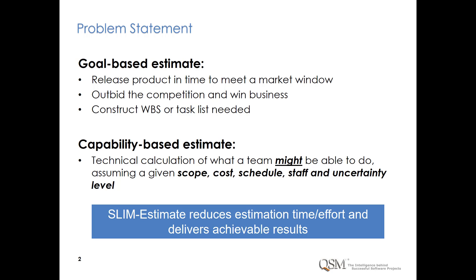Typical projects overrun their estimated schedules and budgets for the following reasons: unrealistic estimates that exceed current capabilities, not estimating scope or the volume of delivered features, failure to re-estimate when scope creep occurs, or not understanding the consequences of adding staff to reduce schedule. In this video, we will show how empirically based estimation tools like SLIM Estimate can reduce estimation time and effort and deliver achievable estimates grounded in actual performance data from real projects.